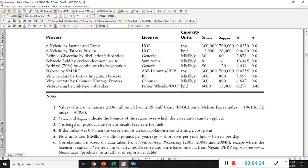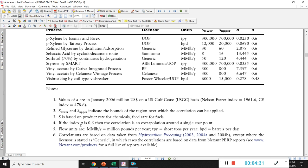S is based on product rate for chemicals or feed rate for fuels. If the index n is 0.6, the correlation is an extrapolation around a single cost point. This is called the 0.6 rule, which is one aspect of scale economics in engineering. It has its origins in the relationship between the increase in equipment cost and the increase in capacity, and is often used as a rule of thumb to obtain investment cost.